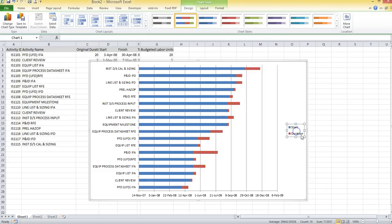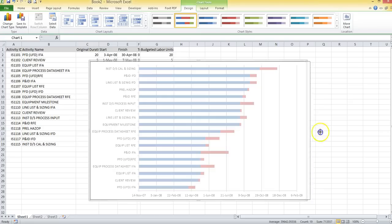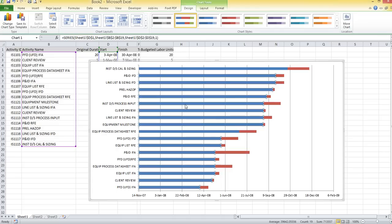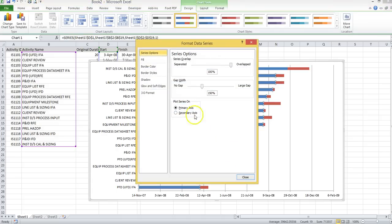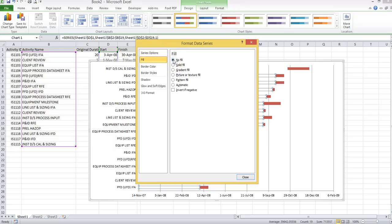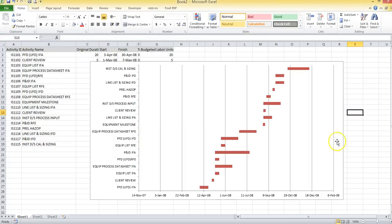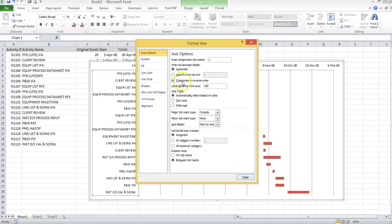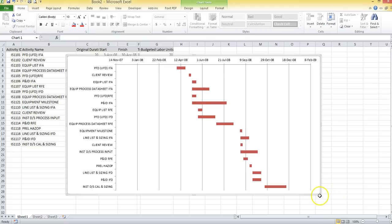You can now get rid of the legend and make some room for the chart itself. You can see it's coming together and starting to take shape. Now we've got to do some cleanup to make it look more like a Gantt. You're going to select the blue bars — which are your start dates — format the data series, and select no fill. This will make the bars transparent, which is what you want. The second thing is to go into your axis, format your axis, and reverse your categories in reverse order. You can see now it's starting to look like a Gantt.